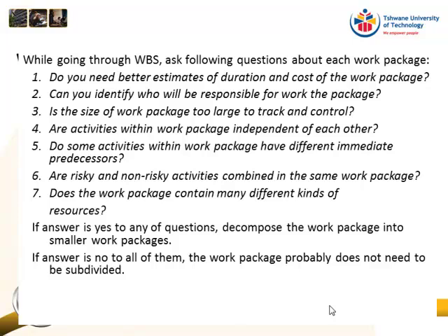This seems simplistic, but this is what happens in our projects in reality, because we don't assign accountability to the team members. Things don't happen because people have loopholes and they can say, oh, but I thought, and I didn't think that part was actually my responsibility, and that's why we need to break things down to the correct level where we can assign responsibility.